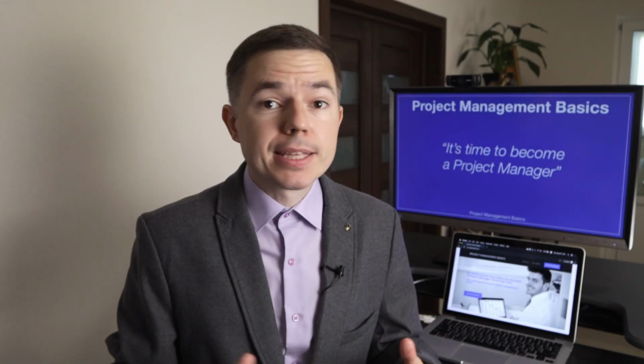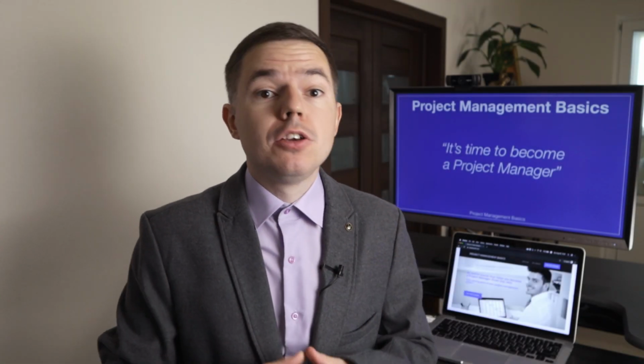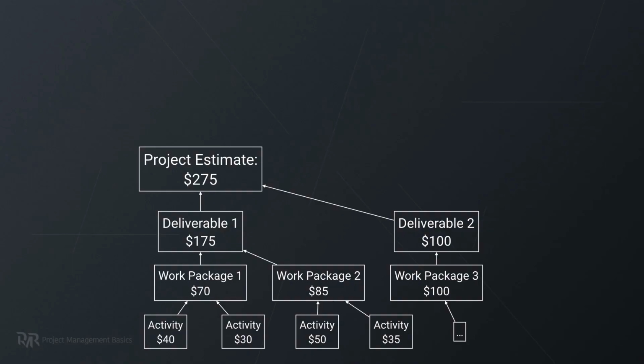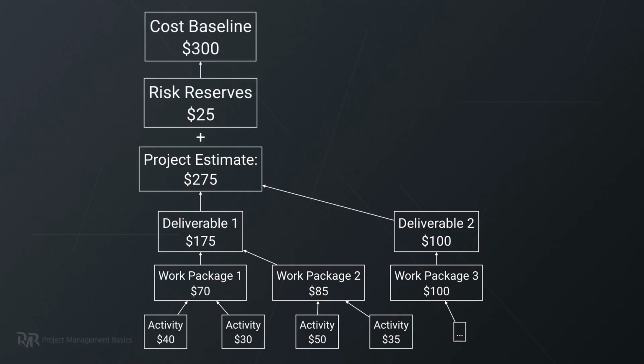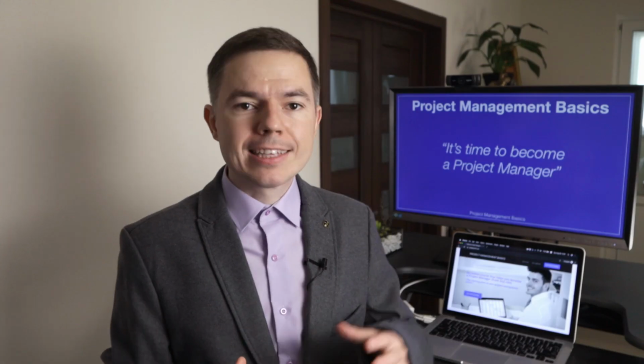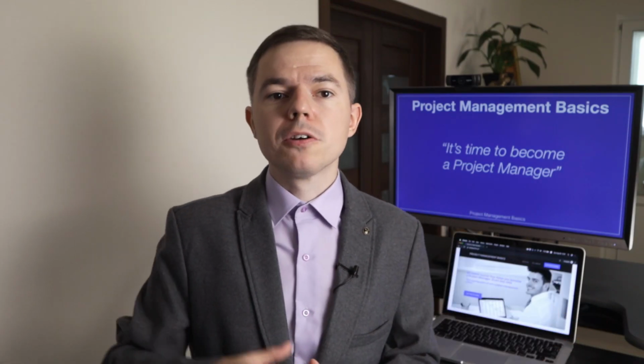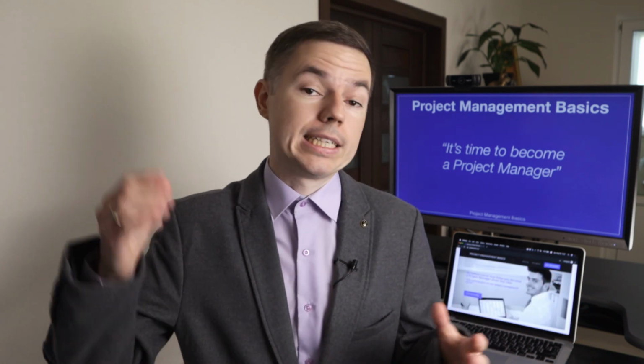So, risk management is not free of charge. In all its aspects, it takes time and money to implement. Moreover, it should be a transparent part of your project. All your risk management activities should transform into specific tasks related to a deliverable. Or it should be a risk resource assigned to a task, work package or a deliverable again.